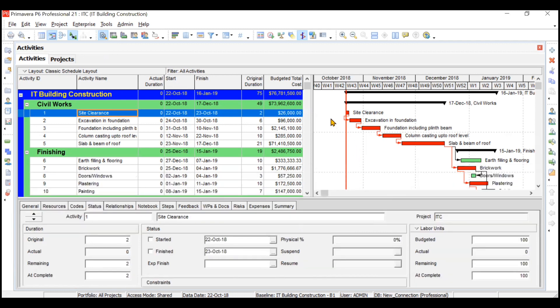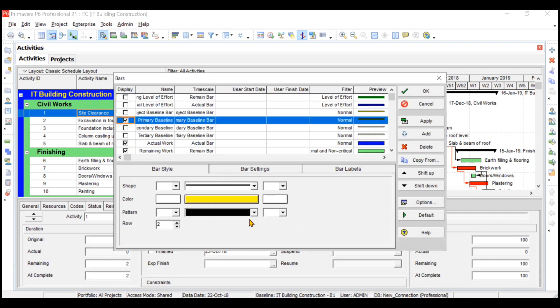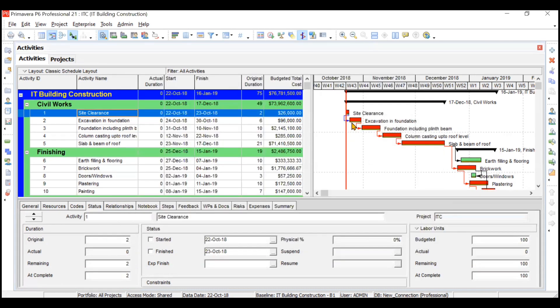First go to the chart view, right-click, go to Bars, and here you can see the option of Primary Baseline. It will be displayed with some yellow color. After clicking OK, you can see very small bars below the red bars. The red activities are our main critical activities; green is also a main activity but not critical. Below these bars you can see the baseline — right now it's just below our main bars because I've kept the baseline dates similar to our project dates.